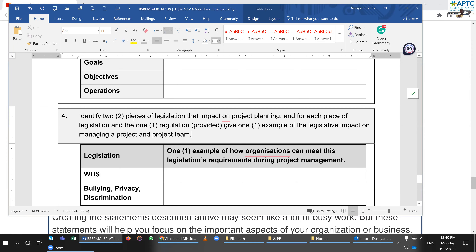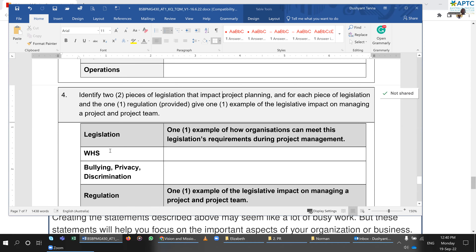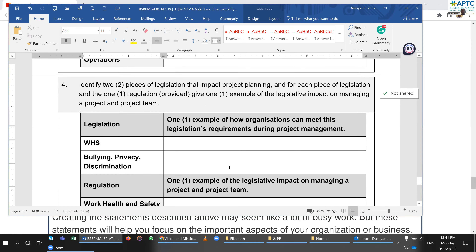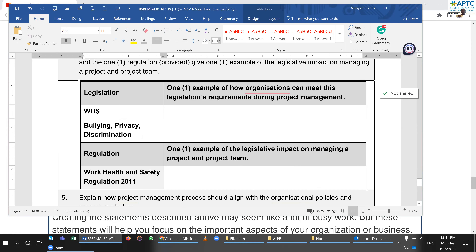Question four: identify two pieces of legislation that impact project planning. For each piece of legislation, identify one regulation and give an example of the legislative impact it has. For example, Work Health and Safety — WHS — is a legislation. Under that we have some regulations: the Work Health and Safety Regulation 2011, 2013 — different states will have different regulations.